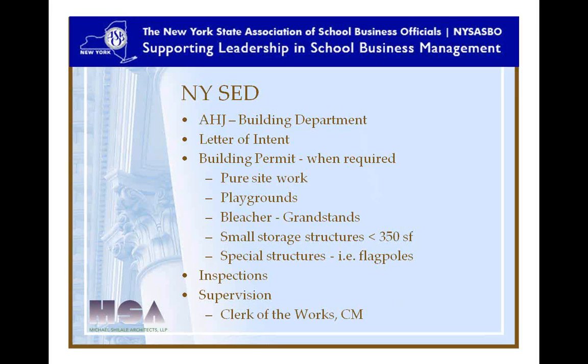When that building permit is required, there are items that do not require a building permit, and they list them on their website in their guidelines, whether it's just site work, playgrounds, or bleachers. Even if you do a project like grandstands or bleachers, we still recommend, if you're not going to get a permit, have your architect or engineer do some special inspections on those projects.